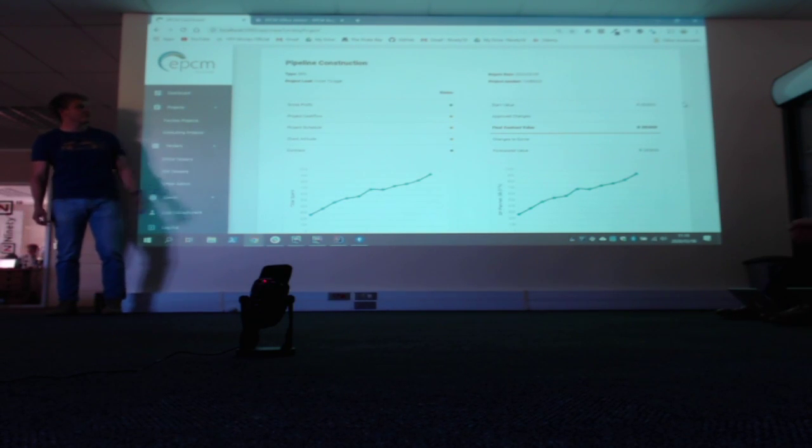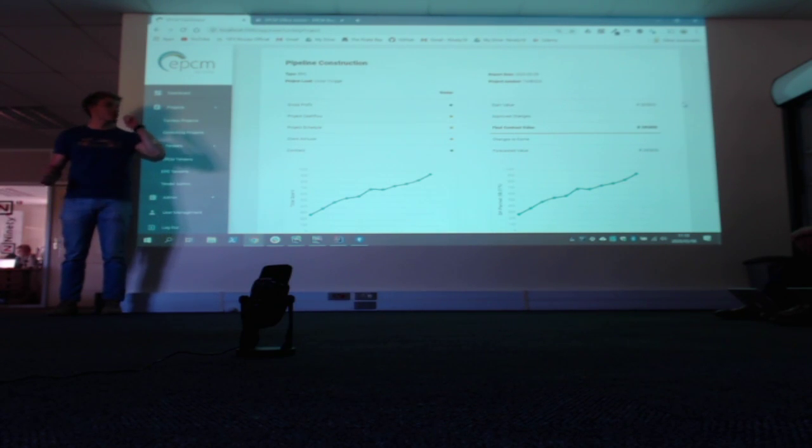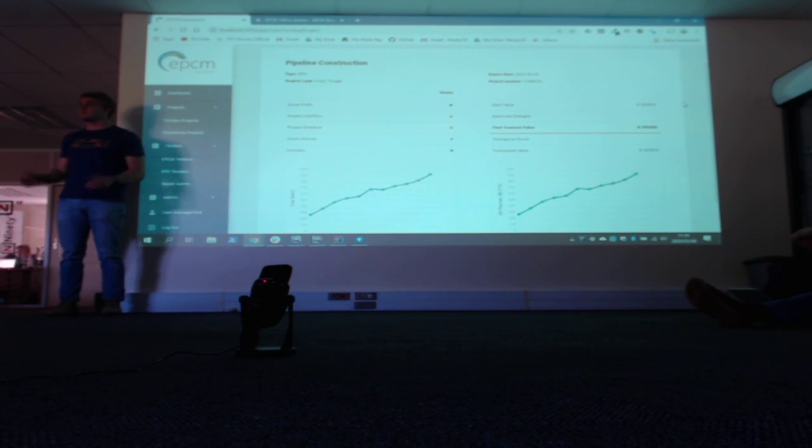So we've actually quantified this. Meaning when the tender guys hand over a project from tender phase to project phase, we usually get a gross profit on that, which is, let's say for argument's sake, 25%. It's the project manager's work to try and increase that GP from 25 up to 30. So if you're 5% above what the tender weight was, then you will have a green status. If you're within 5% up or down, you will be orange, meaning that you're fine, it's not good, but you're fine.